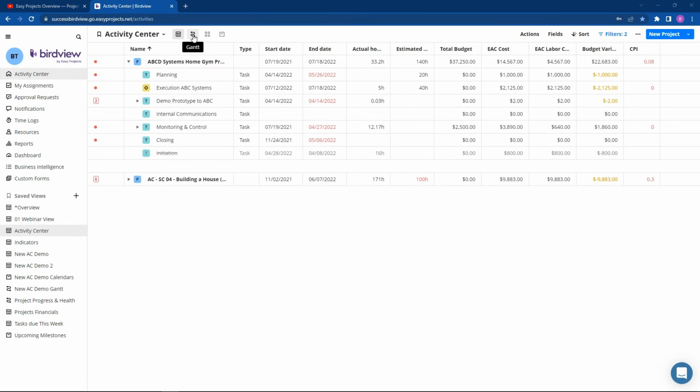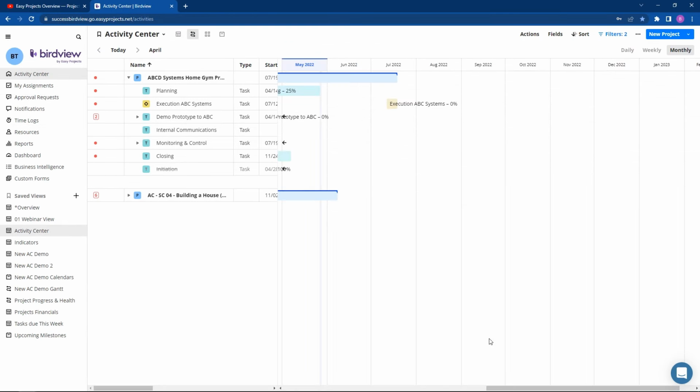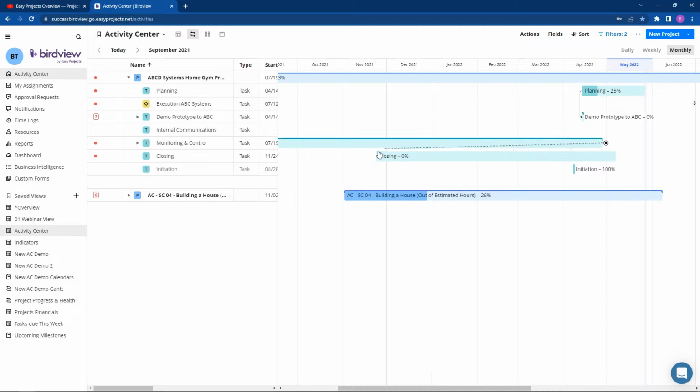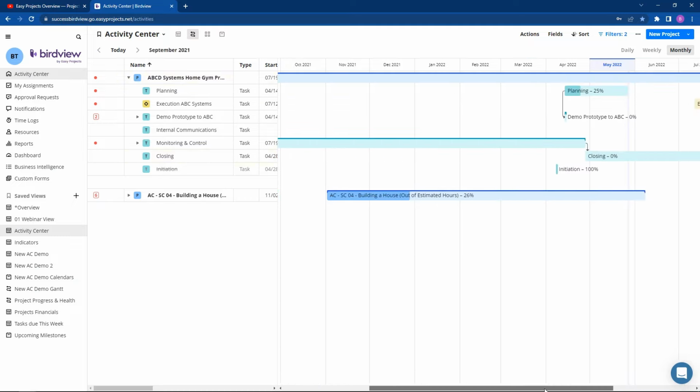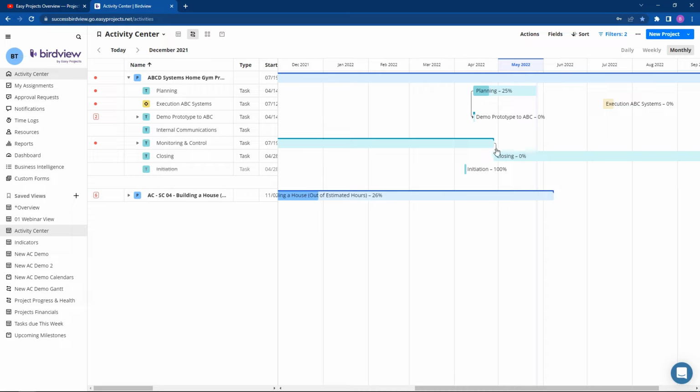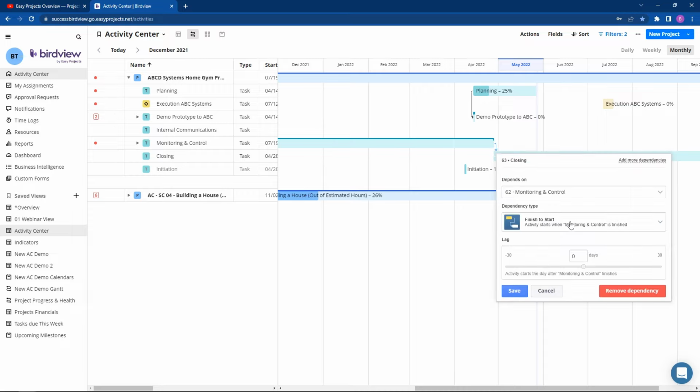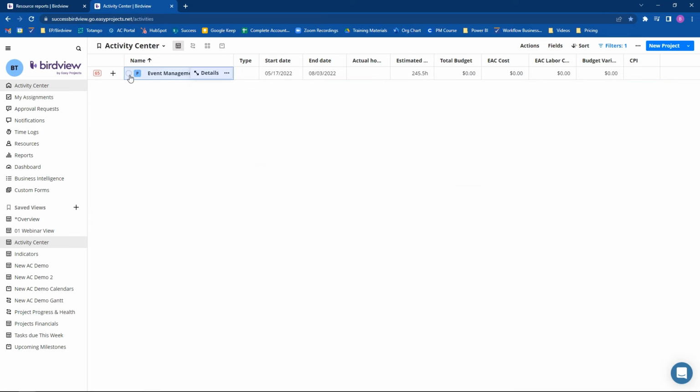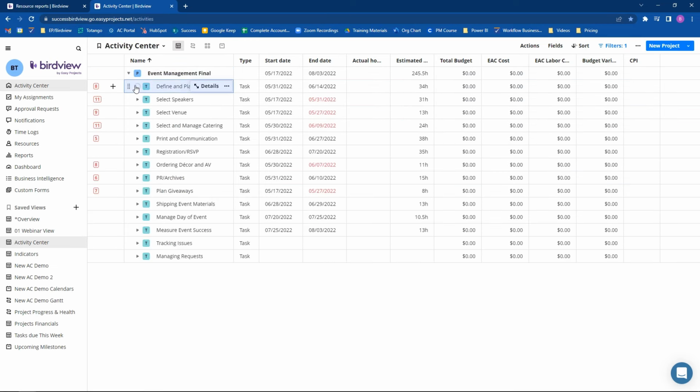The Gantt chart can offer a clear indication of projected timelines and the option to set up dependencies between tasks or related projects. Click the dependency arrow to set lag days or customize the dependency. With the task timeline in place, you will have a clear visual of your project timeline.